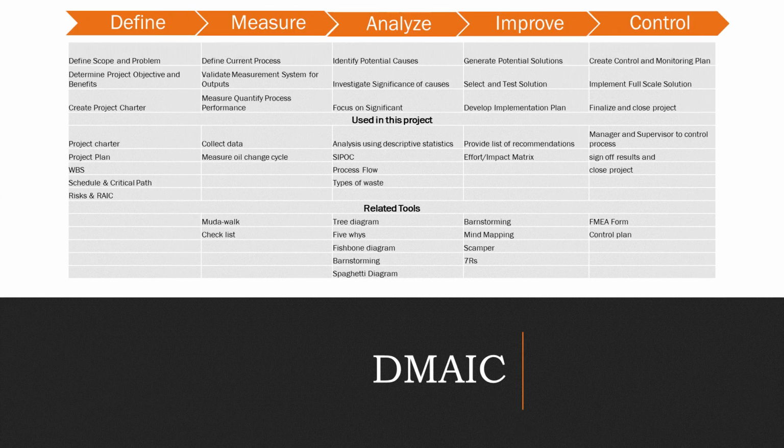Let's create a project plan using the DMAIC framework. Define phase will include a project charter, project plan, work breakdown structure, schedule and critical path, and risks and RACI matrix. Measure phase will include collecting data and measuring oil change cycle time.